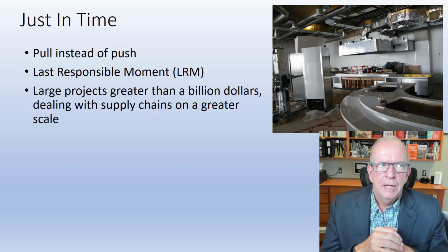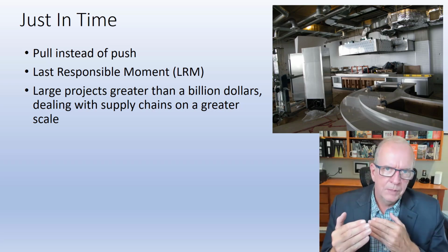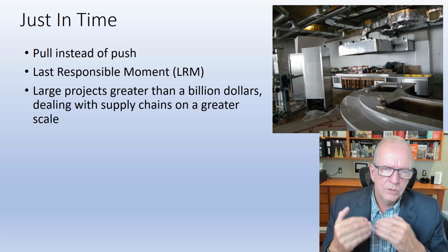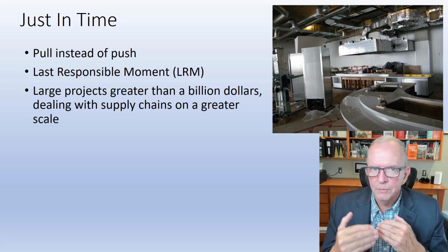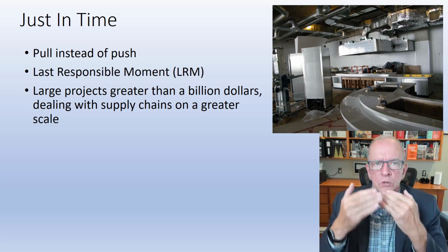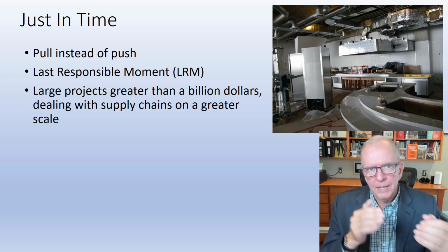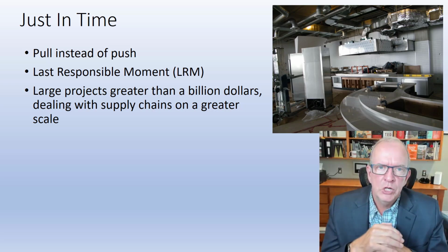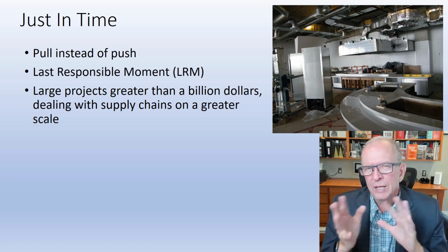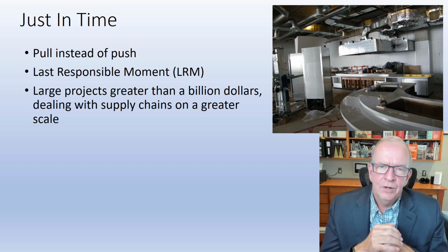Another trade, it's a key item. It's being manufactured by this supplier. We don't always deal with them. We want to give ourselves a little bit of buffer so we know it's there when we need it. So maybe you're getting it delivered a week ahead of time or 2 days ahead of time. Ideally, you're making it as close as possible to when you need it. But you may have some variation in that, dependent on the relationship and the confidence level that you have in that trade or that supplier. That's where I pull in another lean term, Pareto 80/20.